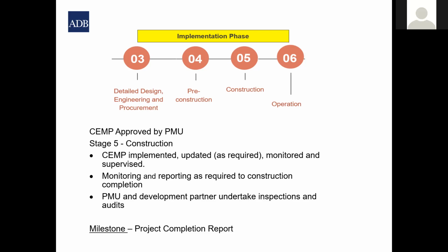Oh, okay. There's a distinction that needs to be made here. Yeah, okay, good point. And that's something that the regulator needs to do. Some folks, I've seen examples where they submit the ESIA or EIA and the EMP and the CEMP together. But the problem with that is that, that's for efficiency, but you must allow the EIA regulator the opportunity to review the EIA reports and the EMP, and through their inputs, then you should develop the CEMP.